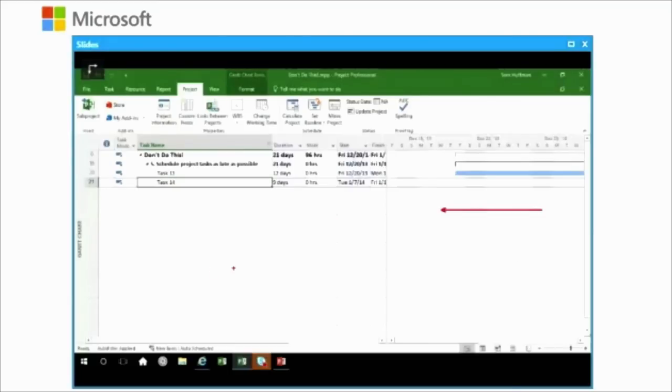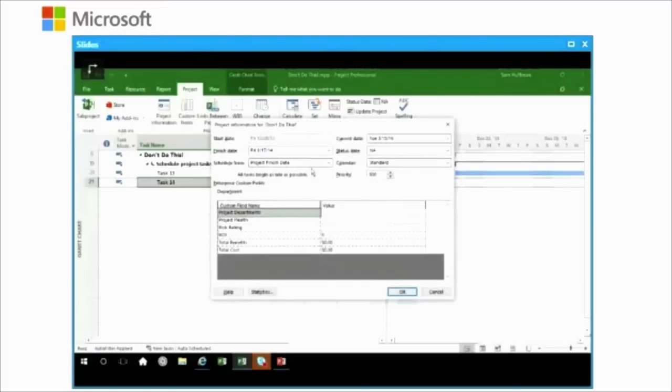My advice, at least in the starting period, when you're beginning a project, is to make sure that you're scheduling from the project start date so that the behavior that you expect is the behavior that you get. Project takes the start date of the project and moves forward. Also, as a corollary, if your project started earlier than the date being displayed as a start date, you'll want to change your project to that date so that you can capture the historical information if you need to, without getting error messages about a task being started before the current start date. I think this will be very advantageous for you to keep in mind as you try your tricks in scheduling here.